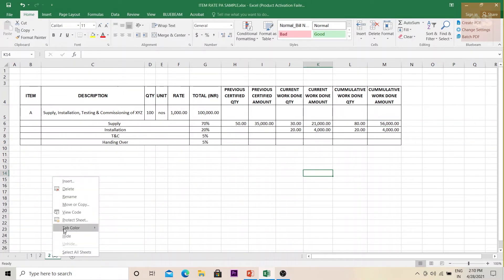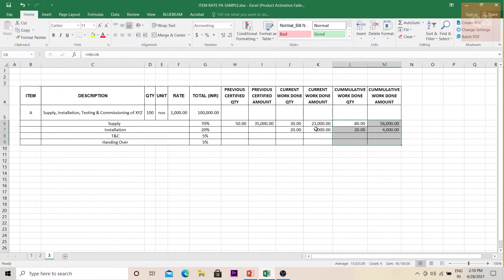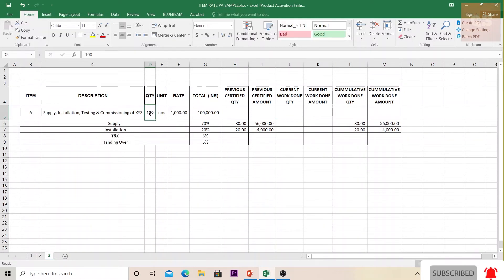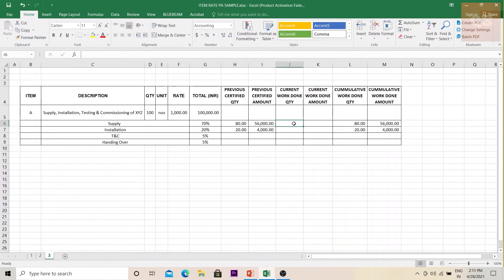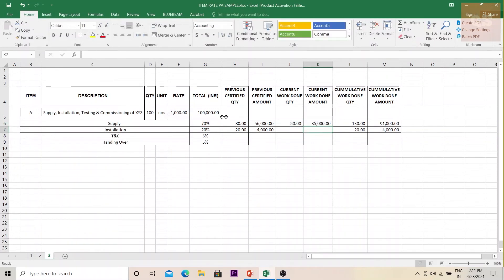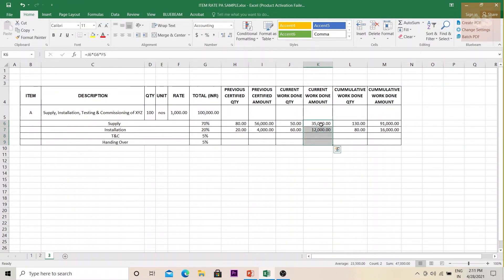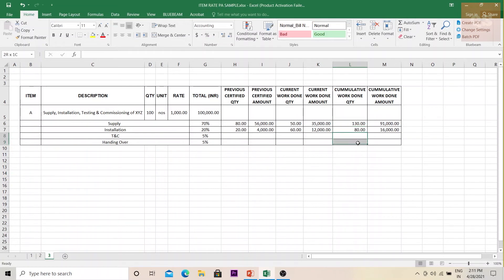For the third invoice, we again copy cumulative to previous and clear current work done. Another 50 materials arrived, so we claim 50 × 70% of the rate. Another 60 items were installed, so we claim 60 × 20% × 1,000. Looking at the cumulative, 130 materials have now arrived on site, 80 have been installed, and none have been tested, commissioned, or handed over yet.